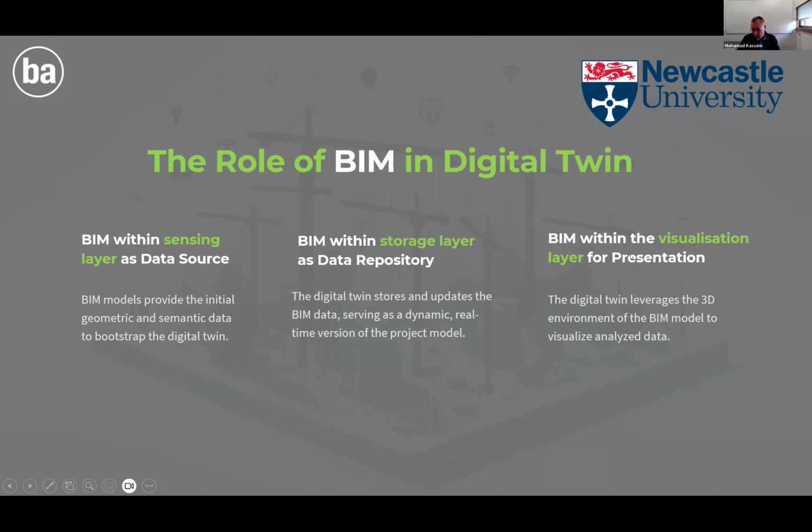Then we feed this information to our machine learning model, and it will create the risk network, which is a causal interrelationship between the project variables and the risks. As a result, for each new project that we have, knowing all those effective project variables that are evident for each project, like the budget and the duration, it can automatically predict the risks, identify them, and evaluate them. So it will technically automate the entire risk management process for us.